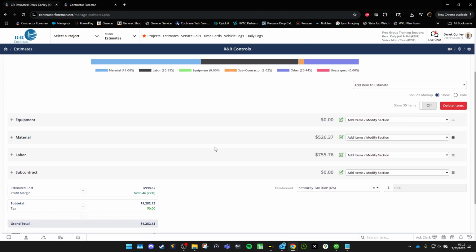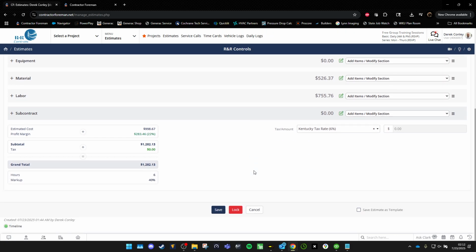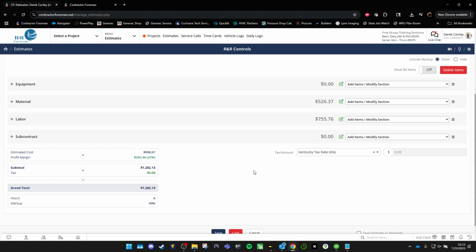Because when we go to invoice a service estimate or a service project, customers want to see how much we spend on equipment, how much we spend on the material, how much we spend on labor, and how much we spend on subcontract. I'll go ahead and show you.